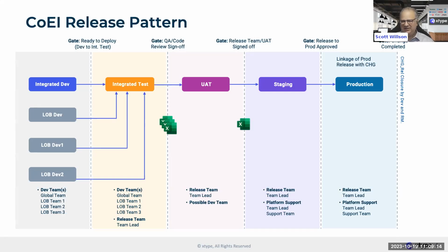And I already animated the other slides here, the other changes, because like you'd mentioned, change management. Exactly. The beautiful thing about ServiceNow is if you're developing on ServiceNow, it can also be your system of record. In that production instance, you're not only pushing the changes, you're also marking in it, right? Oh yeah, this is the change request, this is going through, and the success or failure is designated. And of course, your whole release team and all the different stakeholders can see this.